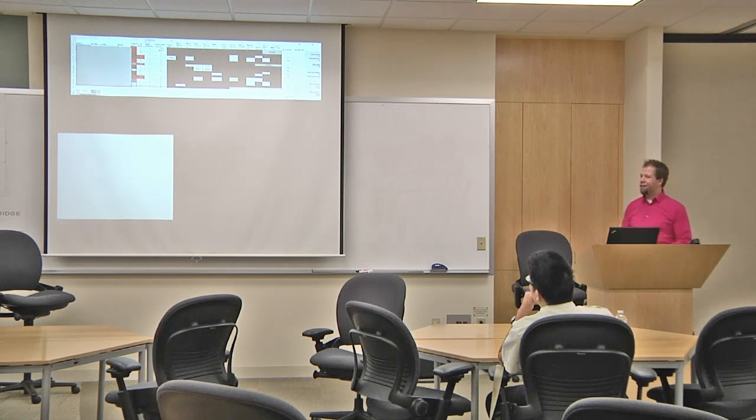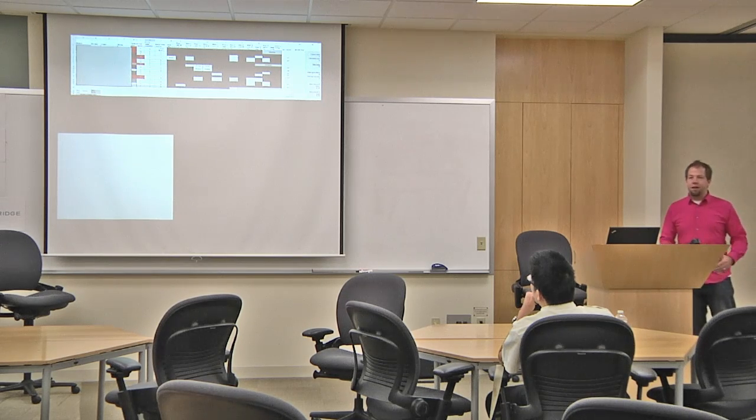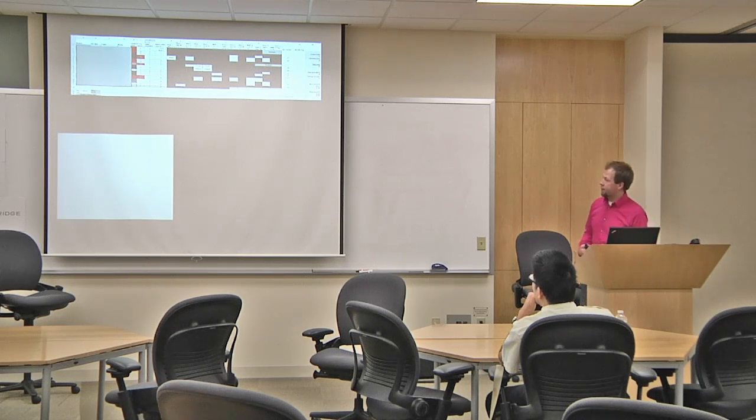The summer of code is like a 12 or 13 week program, and what I do is every week I make students write a progress report. It's a little bit of bureaucracy for them, but my time is not nearly as large as theirs. They're working 40 hours a week, and I have 5 hours a week maybe to spread across all of their projects and try and figure out what's going on.